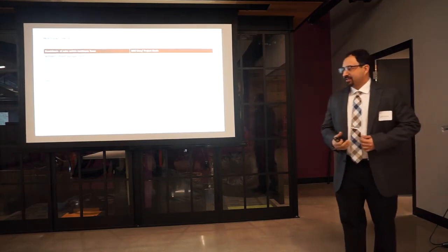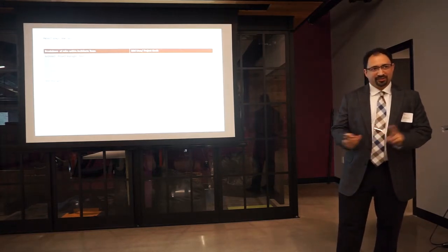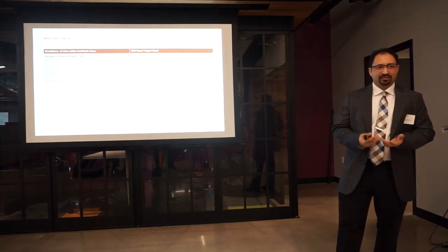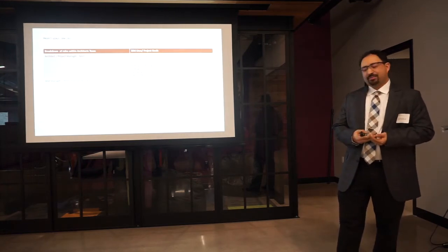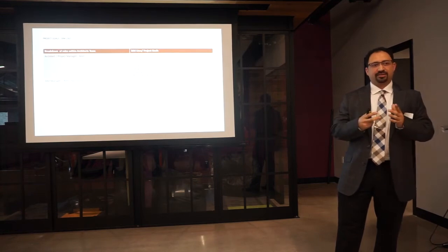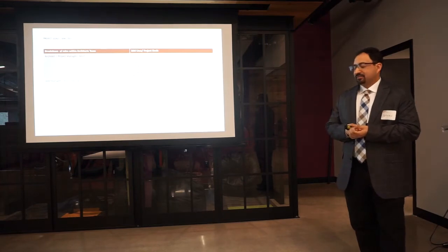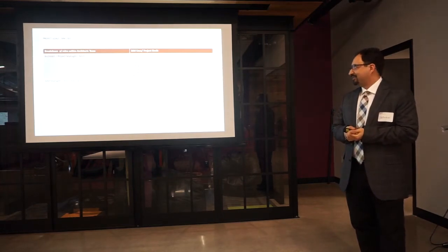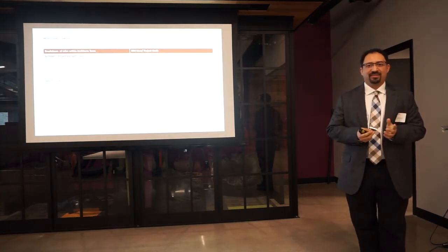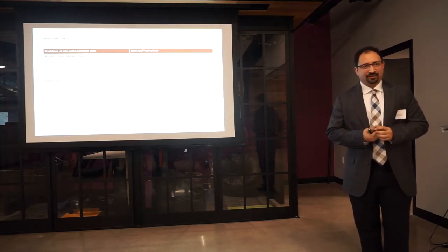To break it down, as our firm ourselves, we were in charge, of course, the architects and project managers were doing the design and the existing conditions. This was a renovation after all. It took about 2 months to get all the existing conditions modeled, and it was a lot of work on that one, especially working around all the offices that were active. We had to work with them, around their schedule, to get the information.